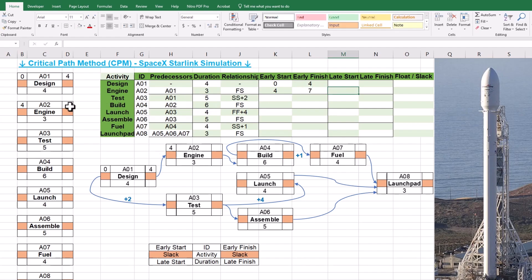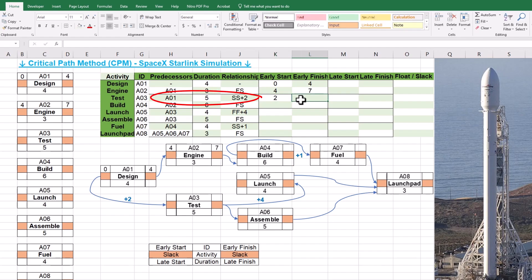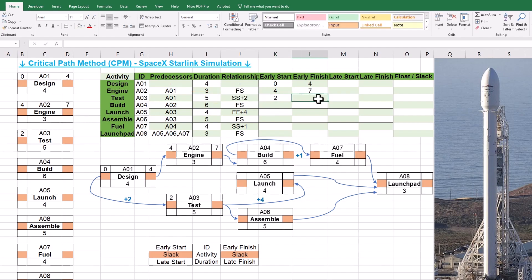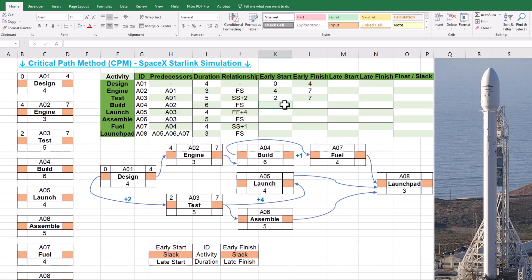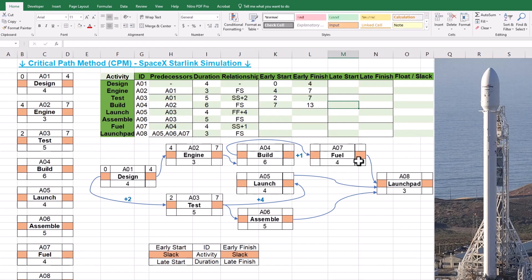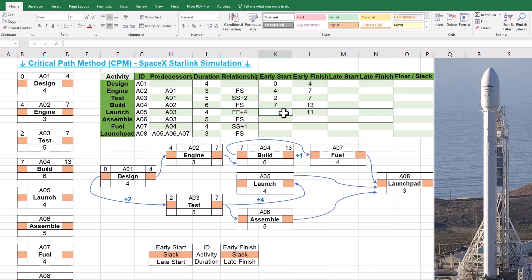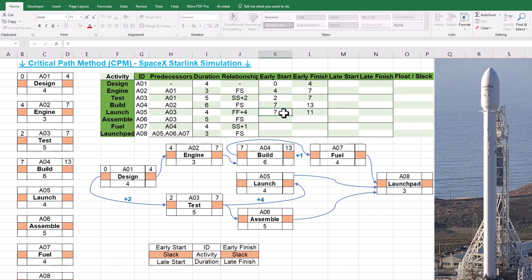Since the duration of A2 is 3, the early finish will be 7. Activity A3 has a start-to-start relationship with A1 with a lag of 2. The early start will be 2 and considering the duration of 5, the early finish will be 7. Activity A4 has a finish-to-start relationship with A2 and its early start is 7. By adding the duration of 6, the early finish will be 13. Activity A5 has a finish-to-finish relationship with A3 with a lag of 4. The early finish of A5 will be 7 plus 4 or 11. Deducting the duration of 4, the early start will be 7.